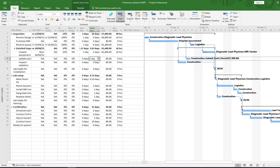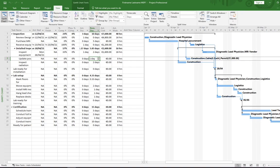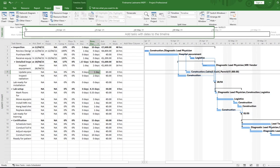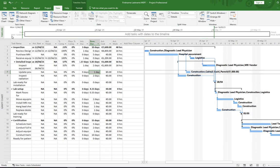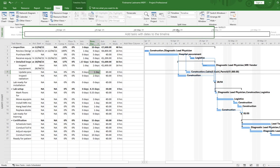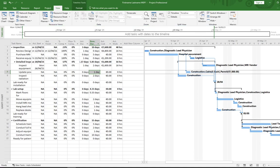Make sure to click Save so you don't lose any of this work. Next we're going to look at viewing the project schedule. Throughout the life of a project you'll need to view it from many different aspects. The Gantt chart is the most commonly used view — on the left is the table with all tasks, and on the right is the graphical timescale. To see an overview, click the View tab and in the Split View section tick the Timeline box.